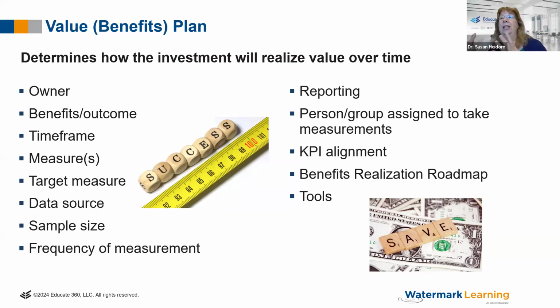So what is that? I don't want to measure right away because it's going to look like, oh my gosh, why did we even do this project? It's worse. Well, it's worse because people have to learn. And so, what does that look like? So I might get a little after 6 months because they're getting more comfortable, 9 months, a little bit more. I might get a little bit more value at the end of the year and they can do it kind of in their sleep now. They're just rolling. So what is that time frame? And again, it doesn't have to be one point in time. It could be multiple points in time.